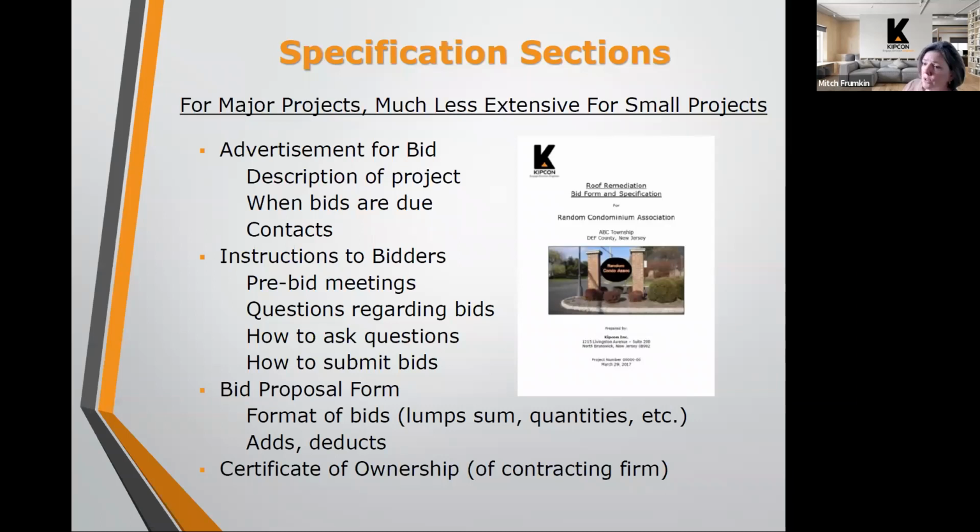In some cases, though, there is not a set day where everyone meets on site, but the contractor is responsible to contact the owner's representative and to make arrangements to come and have a look at the site so that they could submit a bid. And if they have any technical questions about the specifications, we put in our bid documents to contact the engineer. If there's any other type of questions that are not technical questions, they may be directed to the property manager.